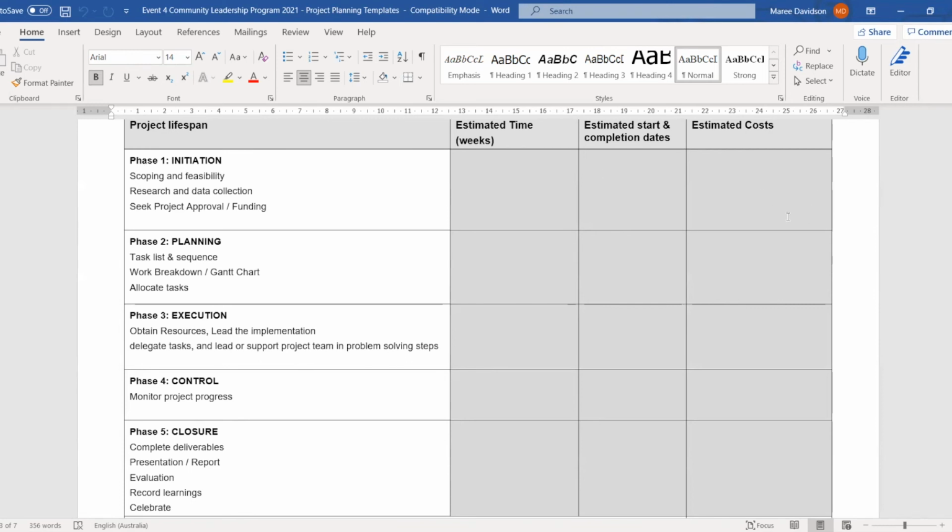And you will see that when it comes to estimating the costs, whenever Alice and I or other people on the team are designing a project, we'll always try to think about the phases of the project, because it makes it so much easier to then determine the deliverables and then determine the costs of each deliverable, right? So people who are receiving a quote from you or a budget from you will appreciate this level of detail.